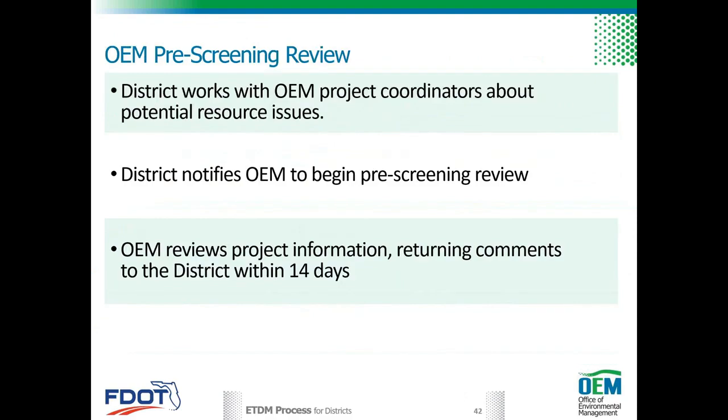So as the district prepares their project information and screening schedules, they begin coordinating with the OEM project delivery coordinators. After they complete their internal QA/QC, they use the EST to send a notification to OEM when the project information is ready for OEM's pre-screening review. At that time, the OEM project delivery coordinator logs onto the EST to review the information provided.